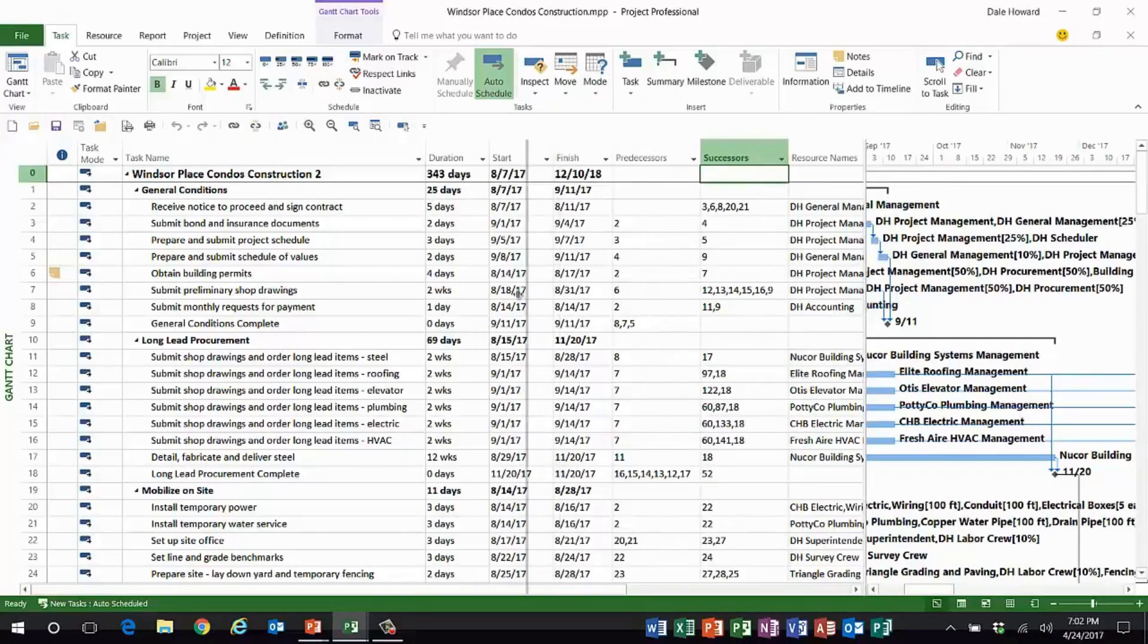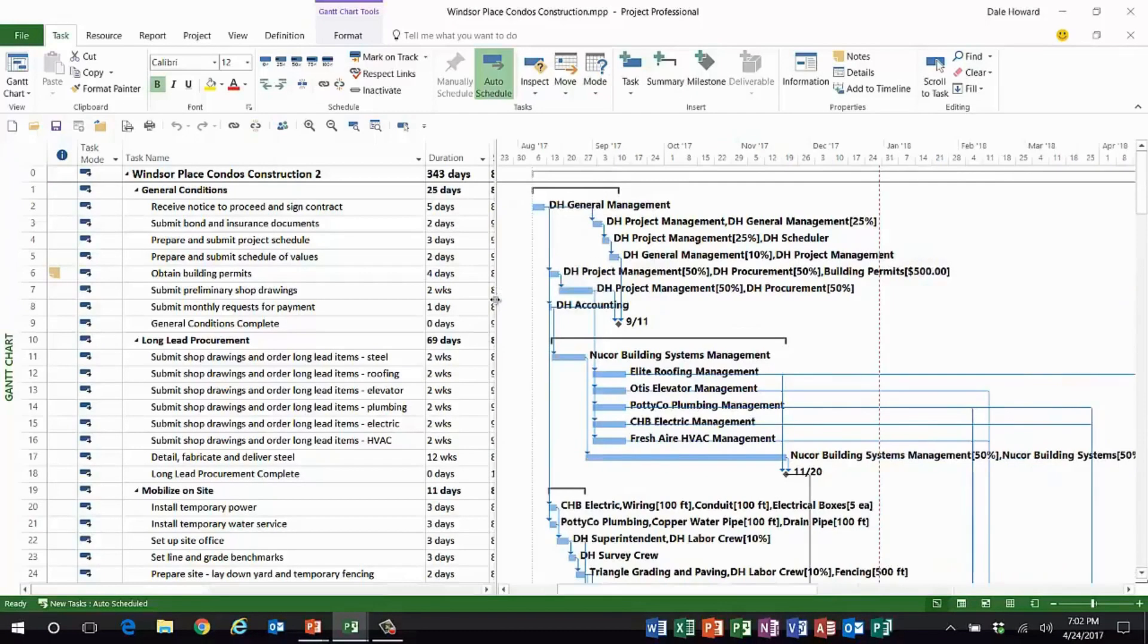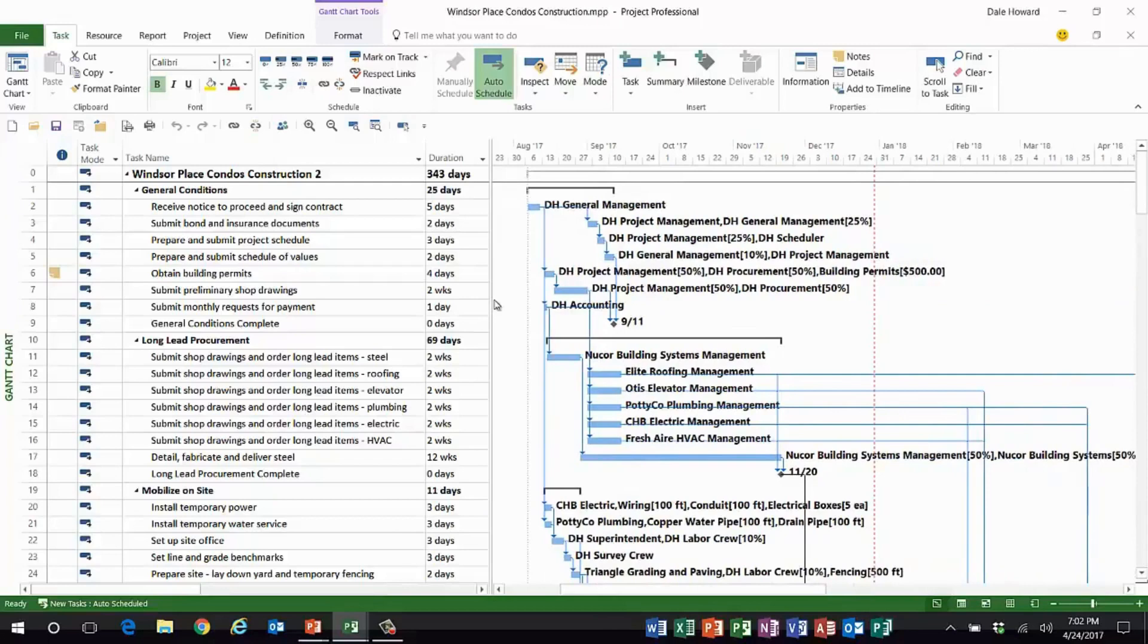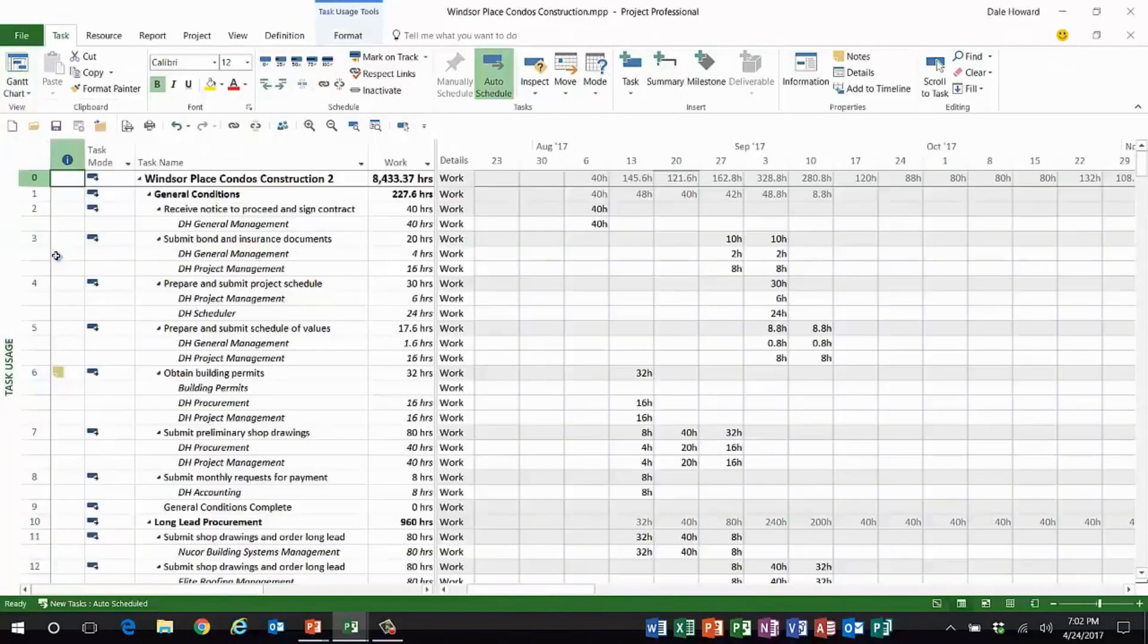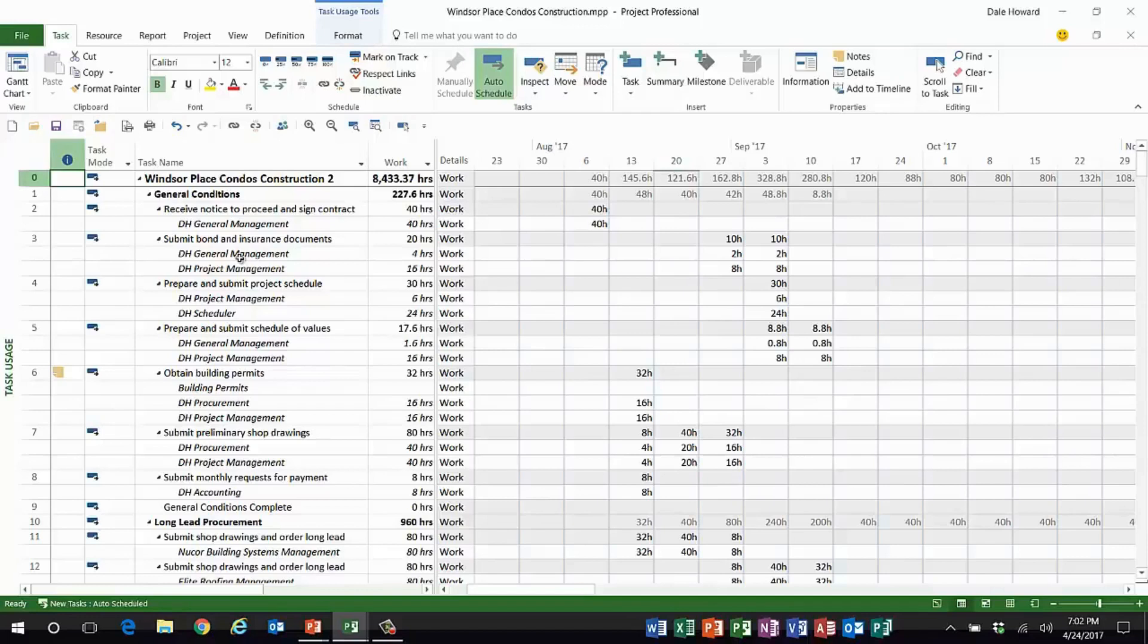You can get a fairly good idea of what task dependency relationships are. But where it gets difficult is when you go to a view like the task usage view. In the task usage view, you have absolutely no idea what the task dependency relationships are.